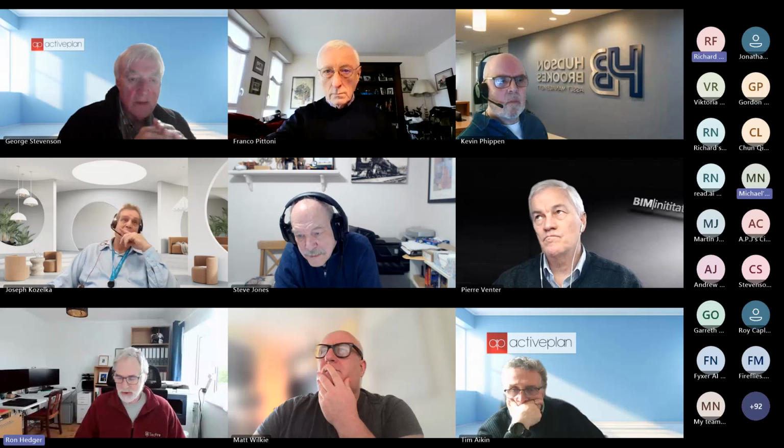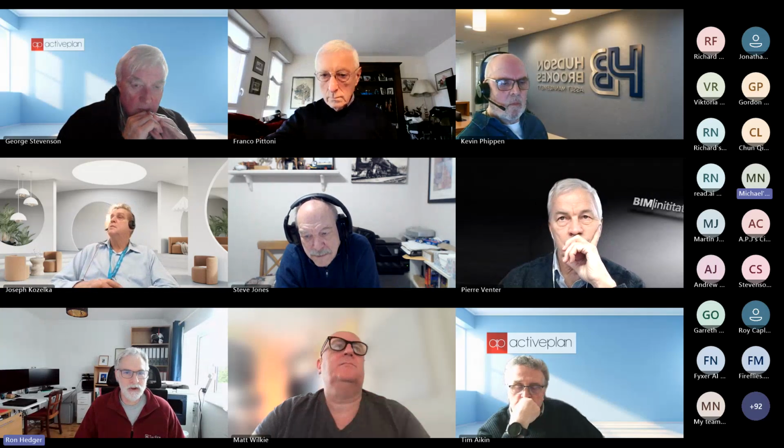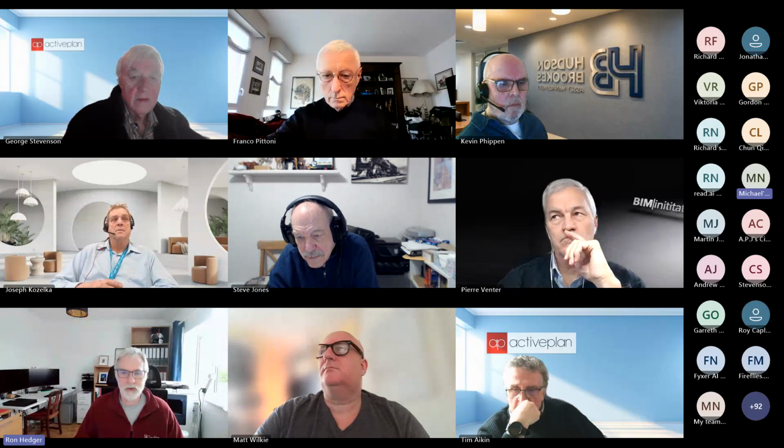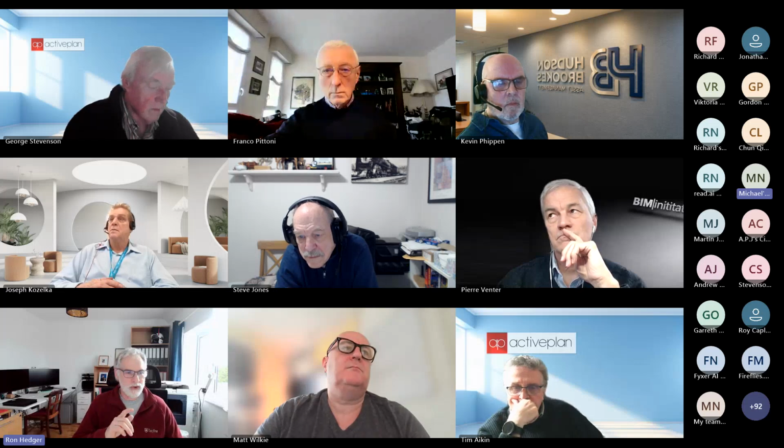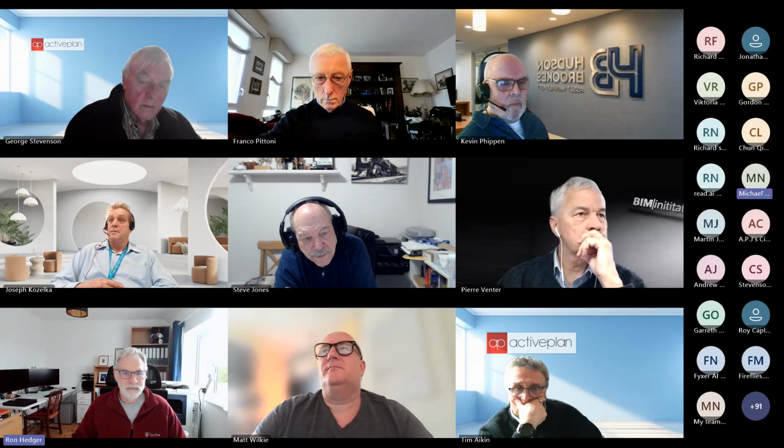Yes. So Regulation 38, building Regulation 38, applies to the sign-off and completion of works that are controlled under the building regulations. I put that in because Matt, you appeared to be referring to Regulation 38 as an ongoing record of the fire precautions within a building over maybe a 20-year period of change. That's not my appreciation of the case.